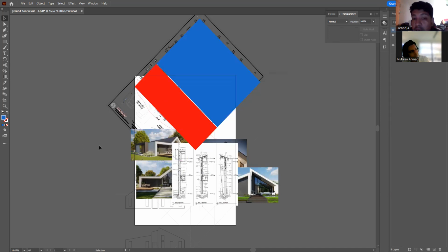Structure drawing is basically the drawings of the steel, sariya, used. Yeah. Steel and connections, and how the beams are going to be made and the pillars are going to be made. It is required after the Chunaiya starts, after the DPC, after post-DPC bricklaying. This is needed. Yeah, I think I will just find out what stage he is in terms of structure. But eventually, when the design changes, then there will be a redesign of the structure. Okay.